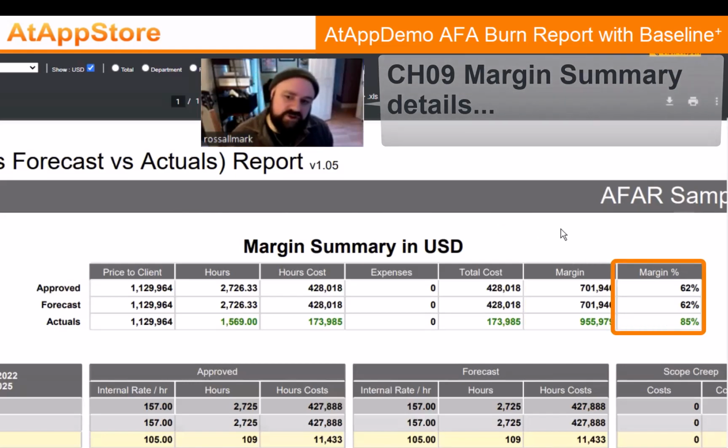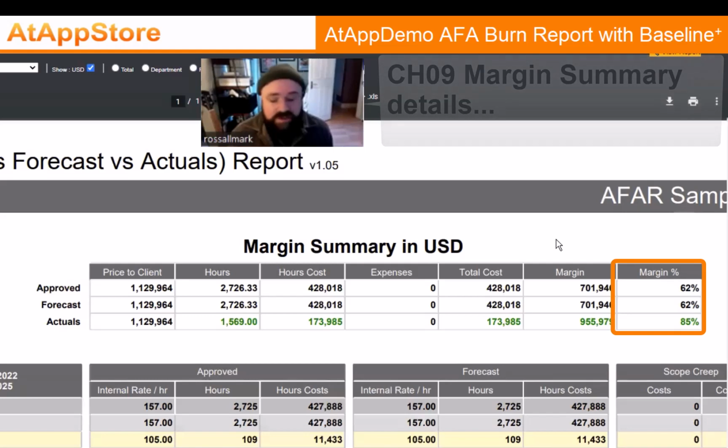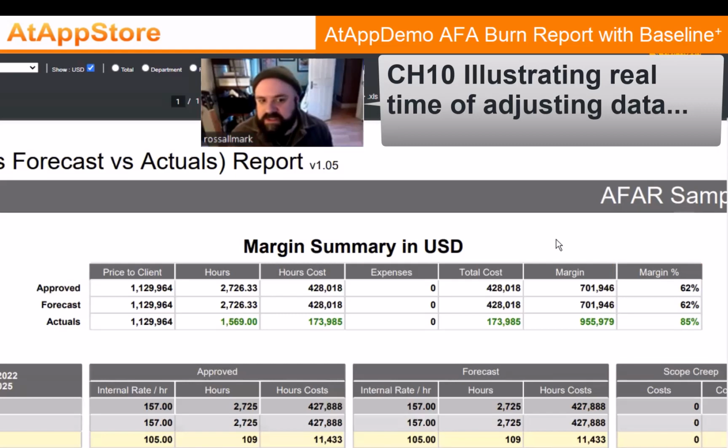And for most professional services businesses, they're going to be looking at that percentage very closely to try and understand where this project is actually going to land. And everyone has different thresholds on what that margin amount should be. In this case, it is calculated largely on the difference between the cost rate of a user or a job role and their billable rate. So that is really a function of that difference and the markup that's made on hours. Although I should say I wish the margin percentage we're seeing in this project plan reflected what our business was currently getting, but sadly it does not. That would be a business that I would very much like to run.